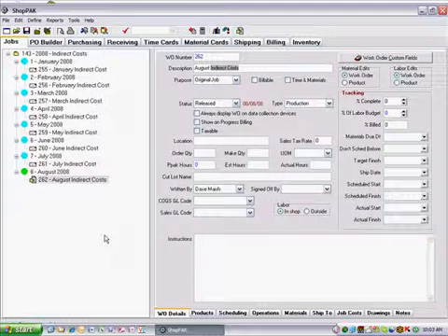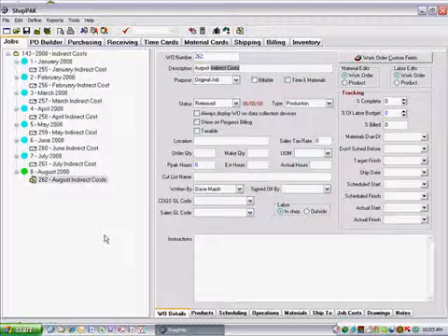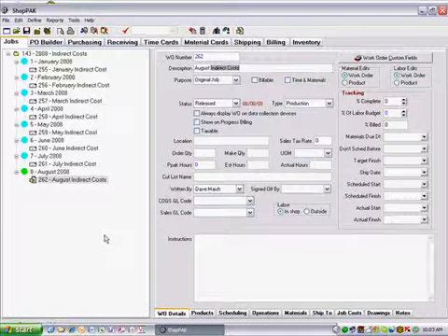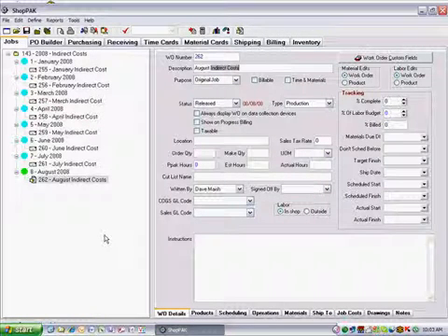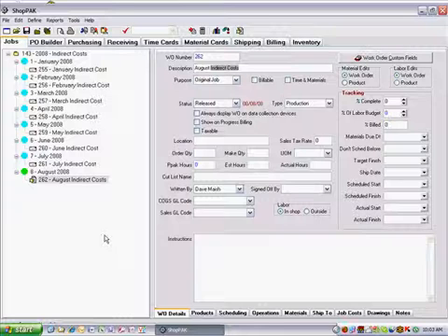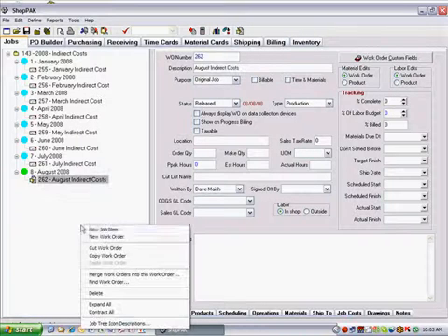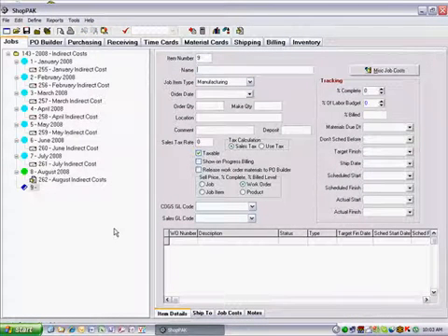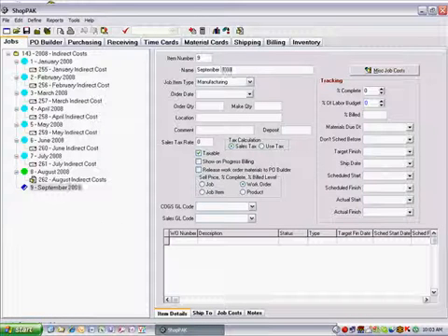Perhaps you consider these activities as part of overhead, and thus don't collect time associated with these activities. However, if you want employees to record how much time they spend on one or more of these indirect activities so you can capture exactly how much time and cost accrue to these activities, we recommend setting up a special internal indirect job once a year to do this. Create one job item for each month of the year, and under each job item, create one work order.